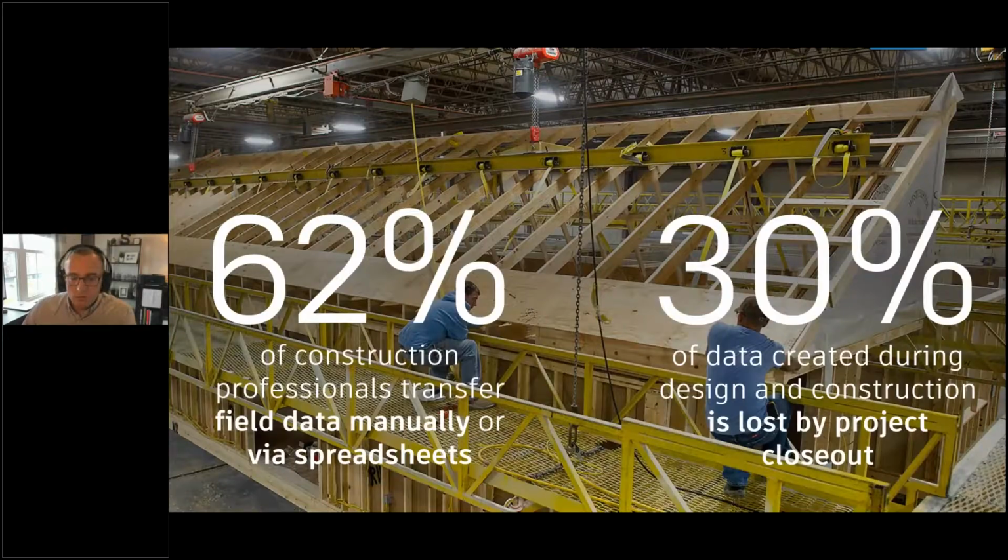So really, realistically here, more than half of rework claims are due to inaccurate field data. When workers have outdated plans and issue data, at best they're going to waste time going back and forth to the trailer. But at worst, they'll actually perform the work and install their work based on that outdated information. At the end of the day, what's your result? Rework.